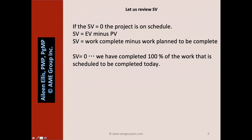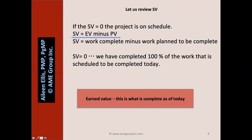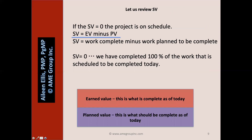Let's review. If the schedule variance equals zero, the project is on schedule. Schedule variance equals EV minus PV — work complete minus work planned to be complete. If the SV is zero, we've completed 100% of the work that is scheduled to be completed today. Earned value is what is complete; planned value is what should be complete. If they equal each other, we are on schedule, or we might say the schedule variance equals zero.